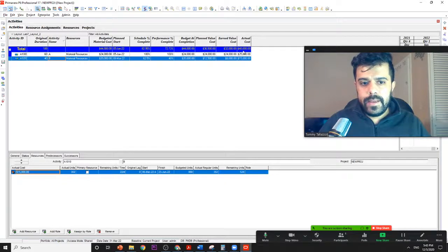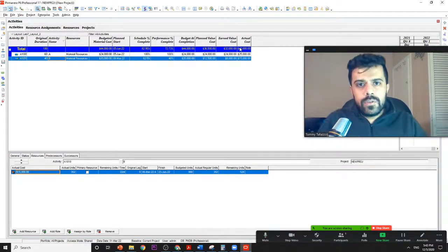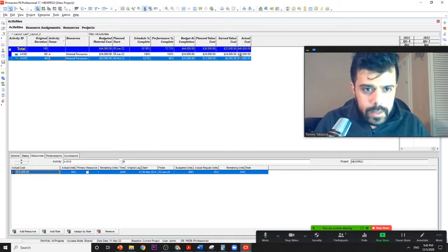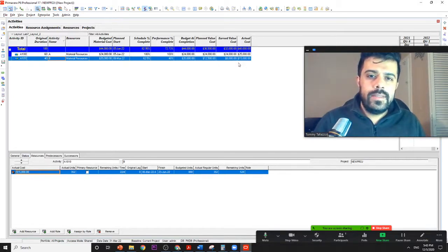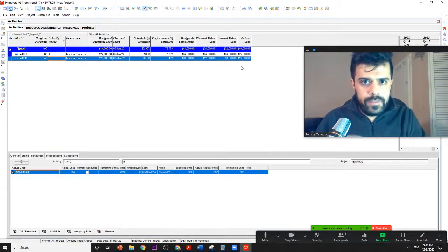And the last thing is, if you want to draw the S-curve, you can change the data date. The only question you might have is that the actual cost is not given at the end of every month. It is just given cumulatively. We just know that so far we have spent this much money. So the way we deal with it is that you can imagine an equal distribution of your cost between the months.